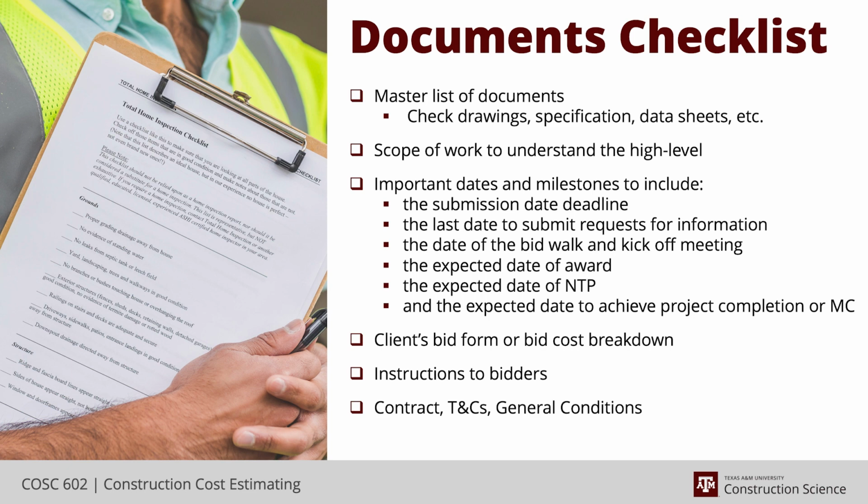So by the time we submit it, all of the data and pricing it's based on has expired already. And we know we're going to have to go buy it in the future, particularly since a lot of our jobs are EPC. We still have an engineering process to finish before we procure. So these dates are important for us to determine our escalation values, because we're going to project an escalation increase of all of our pricing to some level.